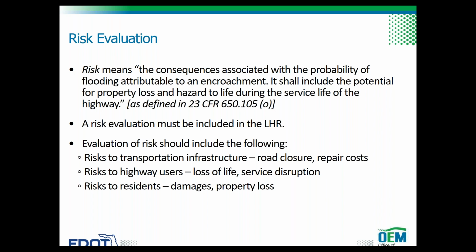Typically, the level of risk is reduced through the application of design standards and drainage design procedures. FDOT has established design parameters for the design frequency, backwater limitations, and limiting velocity, which are based on the importance of the transportation facility to the system and allowable risk for that facility. Additionally, design standards for other agencies that have control or jurisdiction over the waterway or facility concerned are considered in the evaluation.